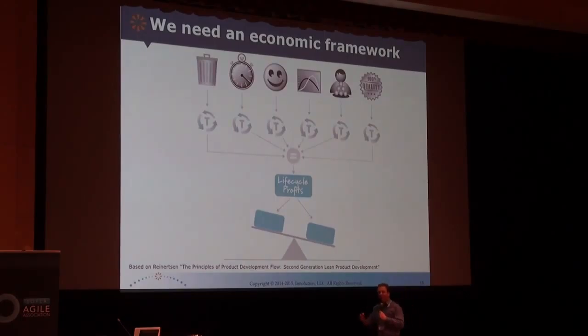I'll prove to you. Let me just try and demonstrate. Think of the project you're working on right now. Think of the date it's supposed to ship. And get that in your head. All right, now I'm going to delay you for 1 month. Whatever that date was, I'm pushing you out 1 month. Doesn't matter why, I'm just pushing you out a month. What's the cost of that delay in lifecycle profits? Think about if you didn't get the product to your users for an extra month, what would that cost you in lifecycle profits? If you can't answer that question right now, you should be very concerned.